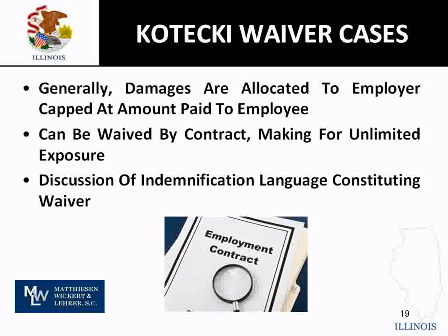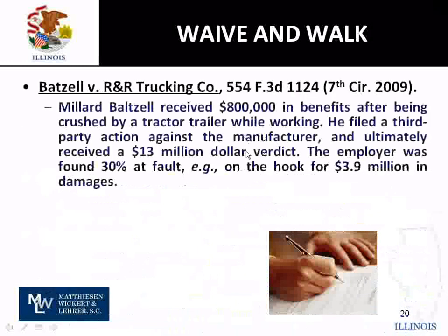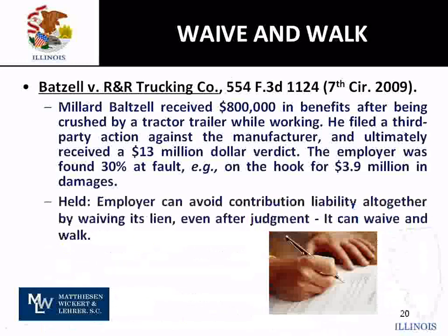There are many different kinds of these waivers. The most common is what I've just said, the agreement to defend, indemnify, or just indemnify and hold harmless from all claims. But it's important to note that there's a lot of cases out there that have discussed these indemnification language waivers. Some of them are held valid, some of them are not, but this is really a case-by-case basis that we need to look at these things on. Now we're going to get to an interesting situation that is possible, and again, most of these come up when there is no indemnification provision. And in Illinois, the employer has the ability to waive the lien and walk.